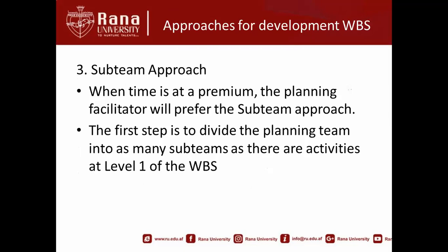The third approach is called the sub-team approach. It is linked to the team approach, but here, time is very important, time is at a premium, and you want to complete a project in a lesser time period. What actually happens is that in the development of the work breakdown structure, the team members will also be divided into sub-teams.